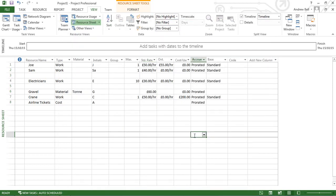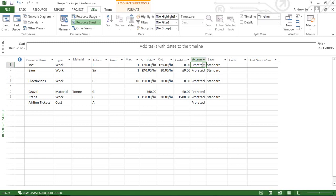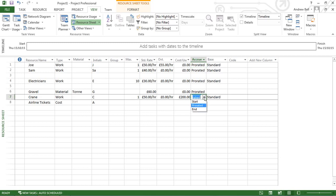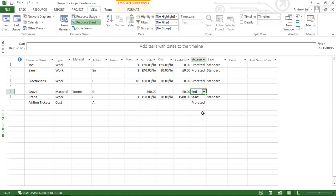The final thing to mention is that Microsoft Project will model your costs. For every hour that Joe works, we're going to accrue his costs pro-rated. It could be that when we hire the crane, we have to pay everything up front. Or it could be that we only pay for the gravel when it's actually delivered, so I could accrue that at the end. Microsoft Project models the project costs using the accrue column. So that's a quick look at the resource sheet view.